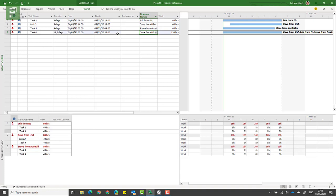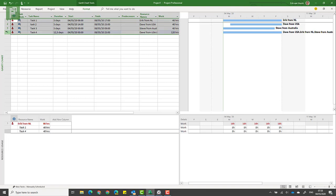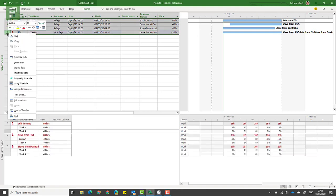If I click on Tasks, Scroll to Task, you see that it still is in one week, but that week starts at zero hundred hours and it ends almost at midnight for Dave. Microsoft Project calculates working days as being eight hours, so actually it incorporates a lot more hours here.